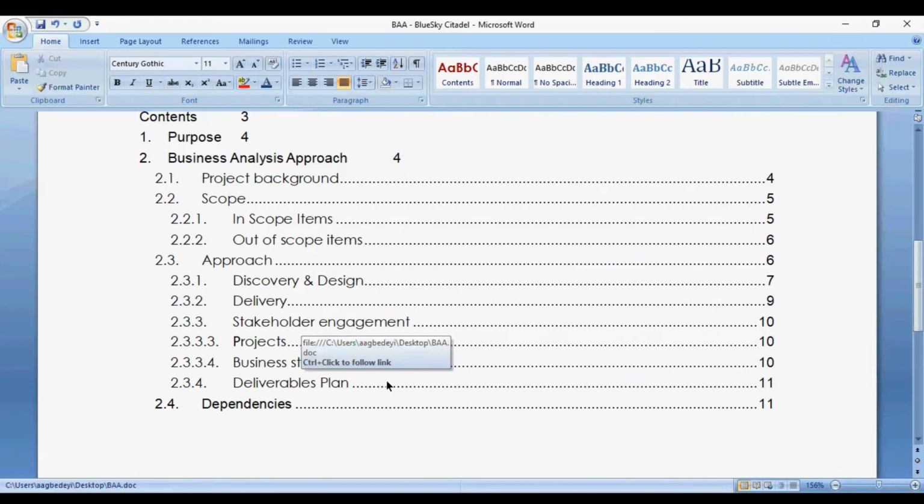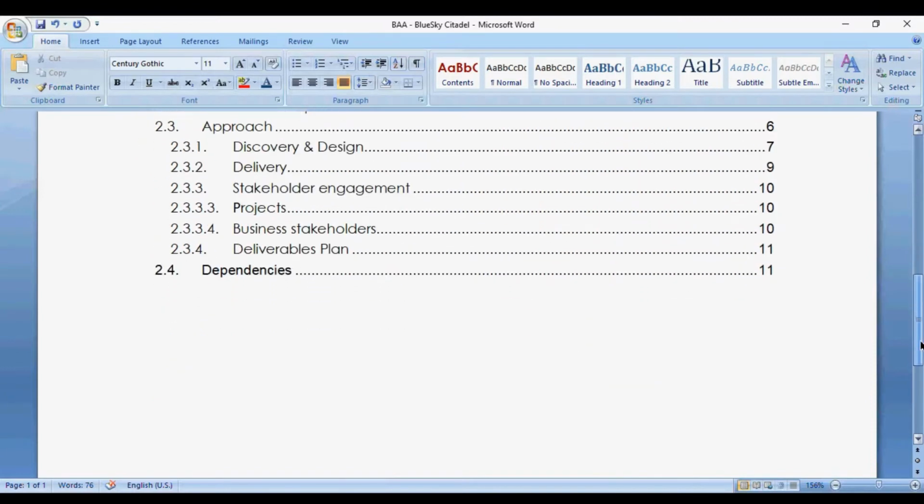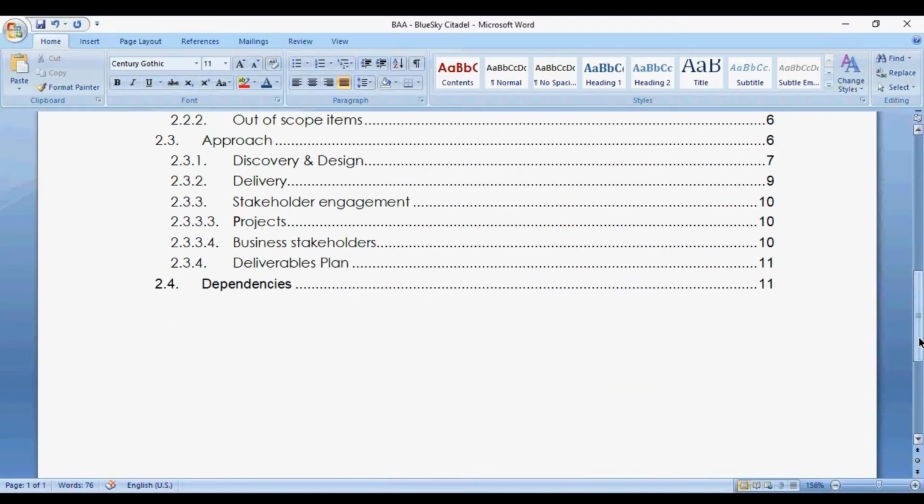Then the delivery plan. The delivery plan is where you list all your documentation, the artifacts that you're going to produce, and the time frame as well. The time frame will just be estimates, it's not really actual dates. It could be 4 weeks, but they will want, for example, something like March 22nd to April 22nd. You can't just say March to April. You understand? They will want something like a rough date.